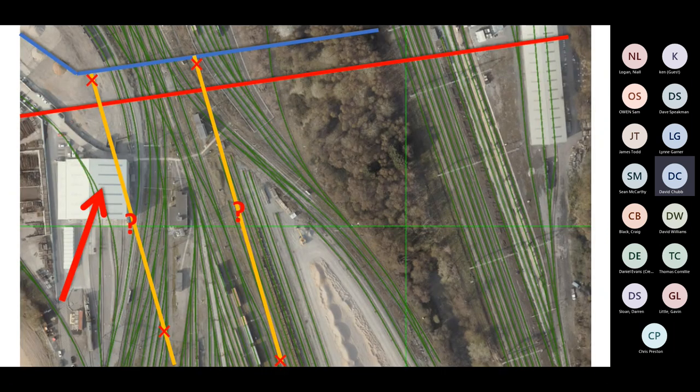So what's that problem? So what does that mean? So we know that we've got two major outfalls that we're trying to use. We know that they drain Basford Hall sidings. We know they were put in after 1901. We know that they run approximately on those lines. We can't blast, we can't jet them because they've collapsed at the ends. At the top end next to Gresty Brook, one's collapsed 3 meters in, the other one's full of concrete.